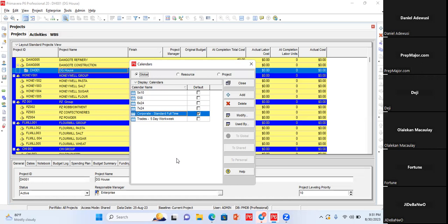In a big construction, they can say 8 gangs. So you have 1,000 resources, you divide them into 8, and assign a calendar because they're working as a team. If they're working at night, you assign that shift calendar to them. If they're working in the day, you assign that shift calendar. Or you just use a 24 hours times 7 calendar for everybody. Whatever your shift falls into, you will work to your capacity of 12 hours a day, and that will resolve that. Does that make sense to you?